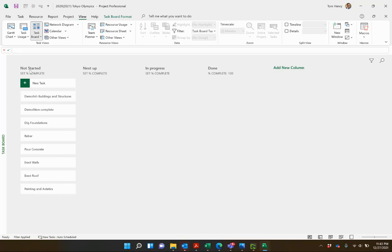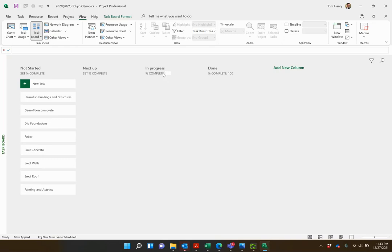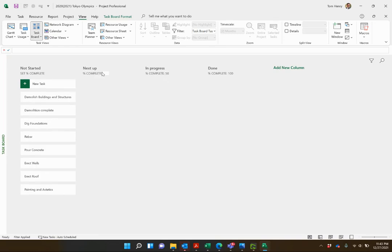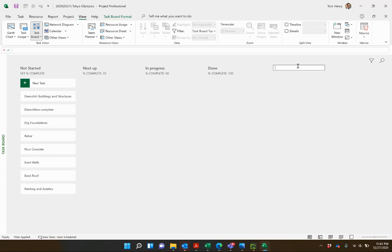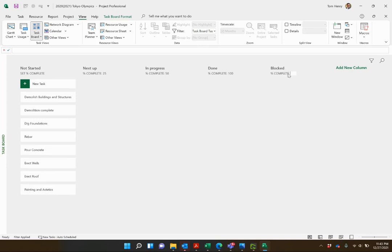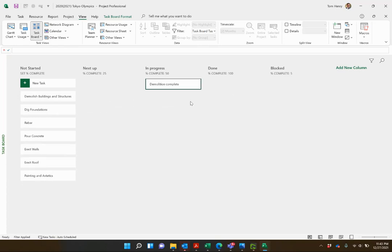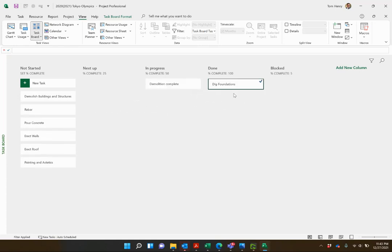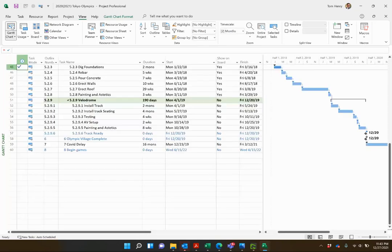Now you can come in and manage these. It's next up, in progress, done. Maybe we'll set this percent complete: 50 when it's in progress, 25 for next up. You can add new columns in here, like blocked, and we'll set that to 5% complete. We got some work done but it's stuck, whatever else you want. You can move these tasks around. When they get to done, dig foundation, you see the check mark here.